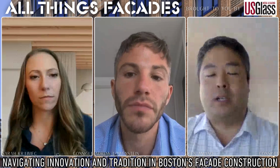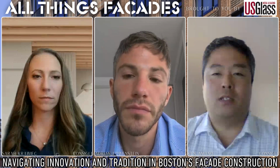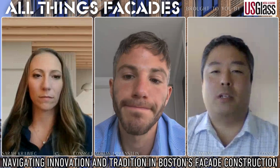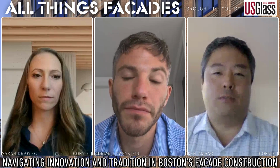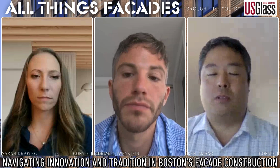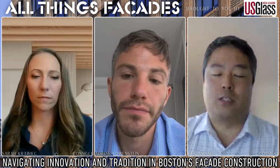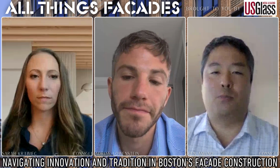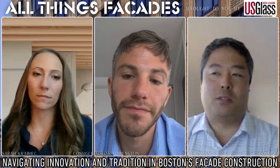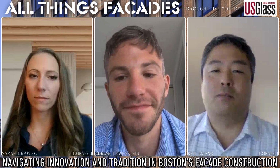So that means that we have to have buy-in from the design team well before CDs are done, which is why we have this partnership, design assist, where maybe at the end of DD, we start talking, and then design's essentially calibrated towards the partner involved in their systems, right? And then there's a lot of structural coordination relating to that too, especially with changes in the code. So that's another key aspect of it. The structure gets fast tracked. There's usually an early design package that gets pushed out for that. All this has to get essentially accelerated. So that's the main benefit of design assist. But we still have projects that go all the way through CDs and they're bid out traditionally.